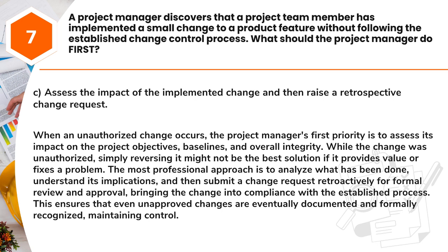The most professional approach is to analyze what has been done, understand its implications, and then submit a change request retroactively for formal review and approval, bringing the change into compliance with the established process. This ensures that even unapproved changes are eventually documented and formally recognized, maintaining control.